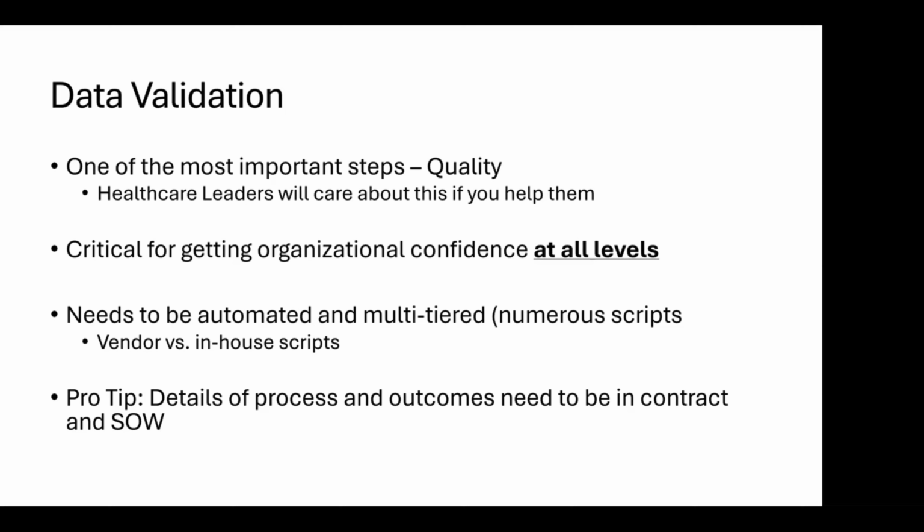It also needs to be automated and multi-tiered. With a lot of our data migrations, it's all script-based for the most part. And if it's not, we always seek to make it script-based. And we have numerous scripts, one to move the data, one to check the data, one to check the check. And a lot of it is very automated. We rely heavily on audit logs.